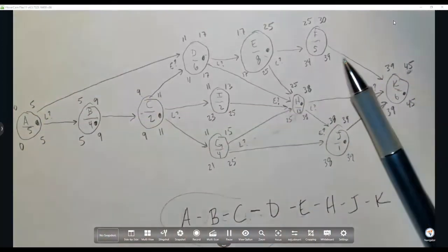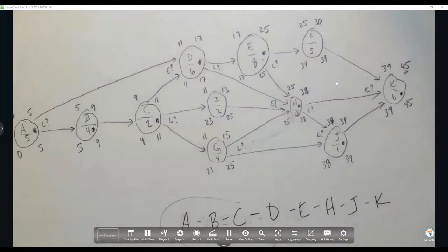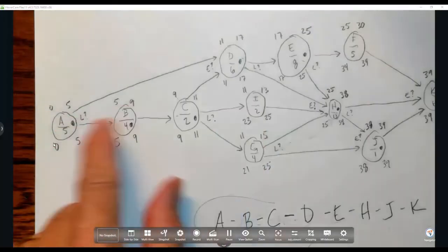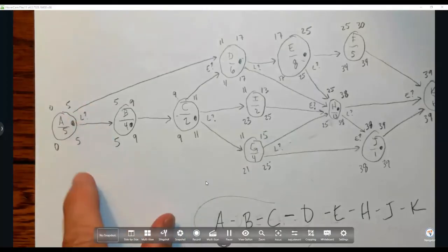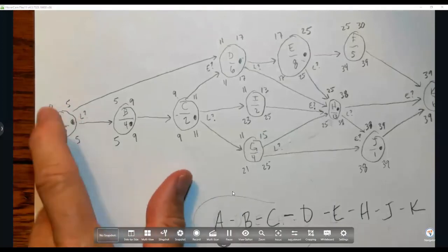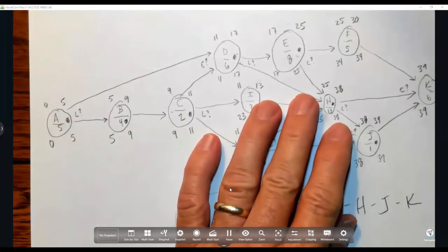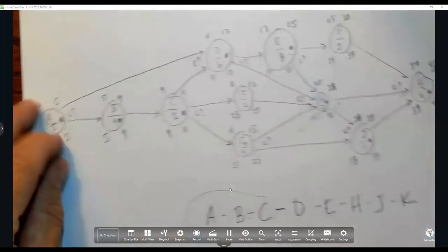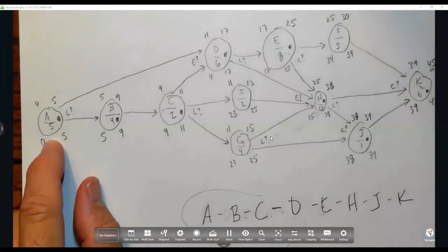So there we go. That is how to do those particular ones. Just take your time, make sure your diagram is big, and make sure that things that you know are on the critical path, such as this, the reason I know that is every single path that I could take goes through this one. Make sure that this ends up at 5 and 5 and 0 and 0, because no matter what happens, this has to be on the critical path. Having this equal 0 and 5 and 0, 5 does not necessarily mean that you did it right. You could make a mistake and then counteract that mistake later on. But for certain, if these numbers don't match on this one, you know you did something wrong. So I would just give you that little bit of advice.